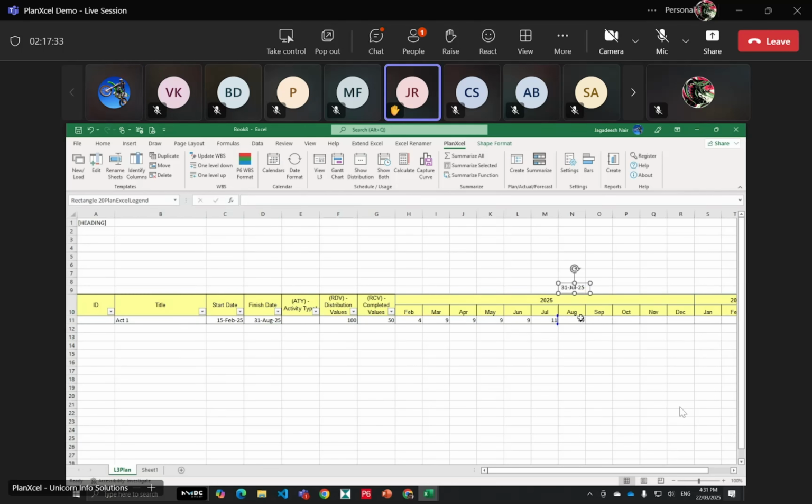This way you can understand that your performance is not good enough to complete on this particular date. This calls for an additional duration to be extended, or additional measures to be taken to perform this in this duration. These types of information automatically come out because we can link it with the curves, and these curves will show you how it is happening.